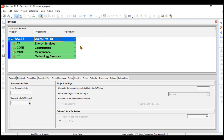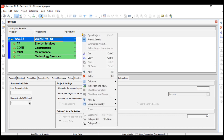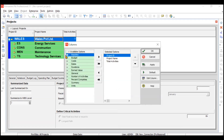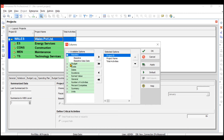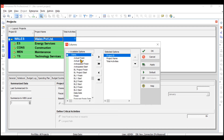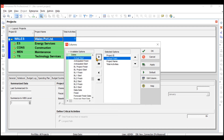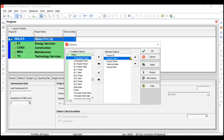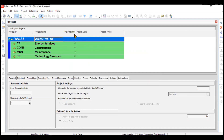One more thing: if you want to customize these columns - right now only three columns are displayed - you have to right-click your mouse, go to Columns, and then Customize. You can see several options. If you click the plus button under Baseline, Budget, or Cost, you can add columns. Let's add Actual Finish and Actual Start. We'll bring them to the last position using the arrow keys and click OK. Now Actual Start and Actual Finish columns have been added.